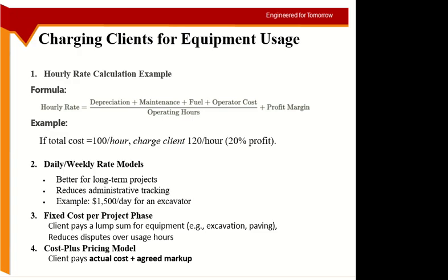If you want to charge the client, then you may have to add some other things as well. For example, depreciation cost. I told you earlier, you may have studied it in economics. It is the reduction in cost of the equipment because of time. As the equipment gets older and older, a certain percentage of cost keeps on decreasing.